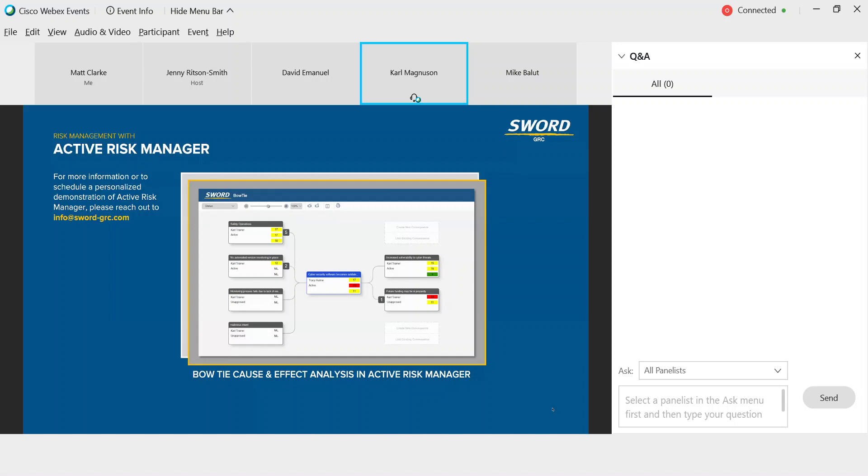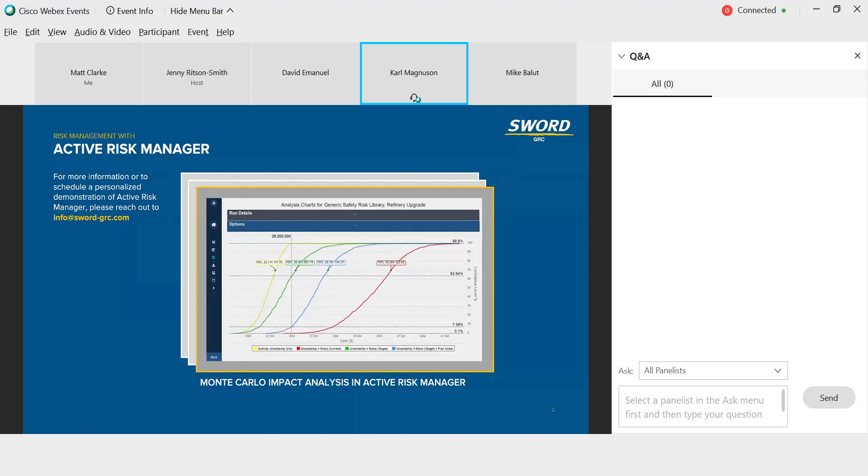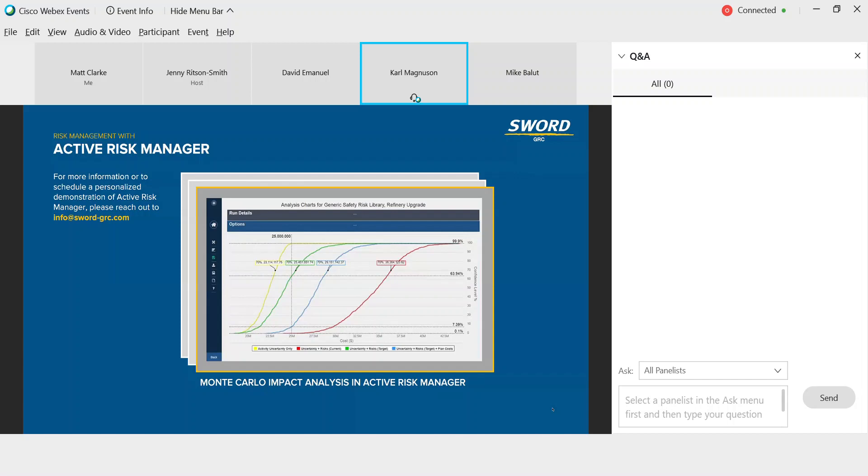Next, we want to apply quantitative impact ratings and statistical analysis techniques to help drive objective decision-making about the treatment strategy and resource prioritization for risk mitigation and opportunity pursuit. As you can see here, Active Risk Manager allows you to seamlessly run Monte Carlo and follow-up impact analyses directly on your risk data, which can provide valuable insights for risk-based decision-making. And of course, we also want to document project events and outcomes when they do occur. We don't want to wait for a lessons learned review years from the end of the project, since it might take several years to complete any individual project.